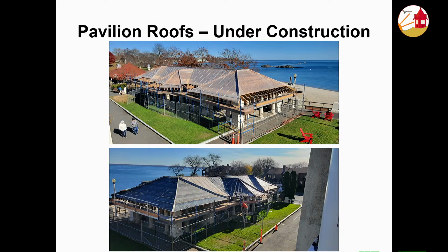The lead time on the clay tile is about 6 months. So when we got approval for the street side pavilion, the order goes in, and our contractor does a lot of work with the clay tile provider. It's Ludovici. They're the guy to go to for clay tile roofs. And we added the beachside pavilion tile to the order. Obviously, it's going to come later, but we're not looking at the 6 months from a timing perspective.